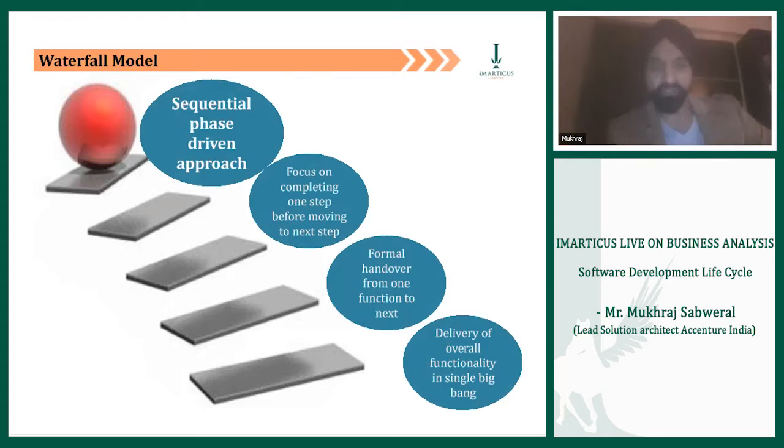So guys, waterfall was like that. It was a sequential approach. You finish one thing, and only then the next phase begins. For example, first the business analyst will complete the whole analysis. Only after that will it go into designing. Once the complete design is written, only then does it go into functional configuration and coding. When the coding completely finishes and is signed off, it goes into testing. So the focus is on completing the first phase 100% without which it doesn't step into the next phase. I would call it a good way of doing project methodology.